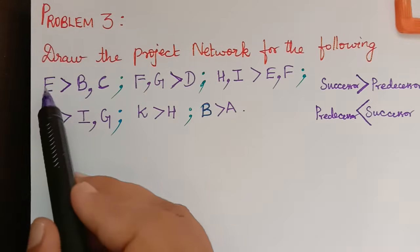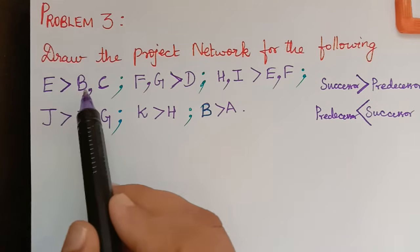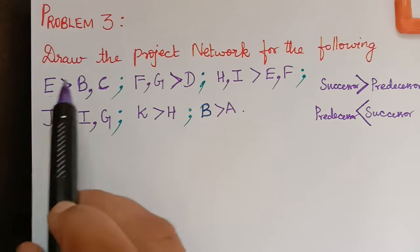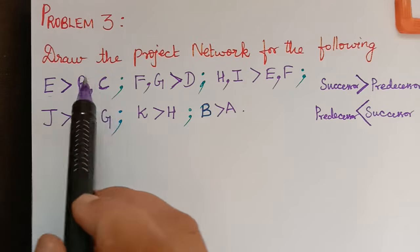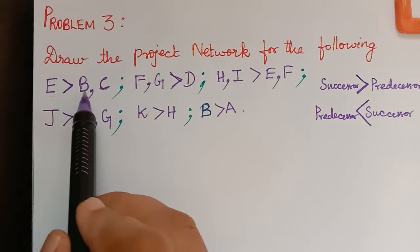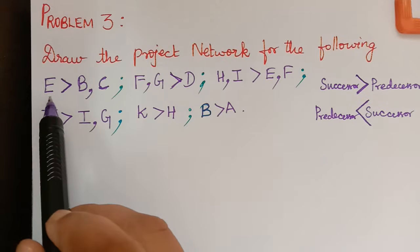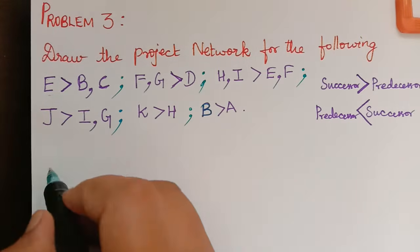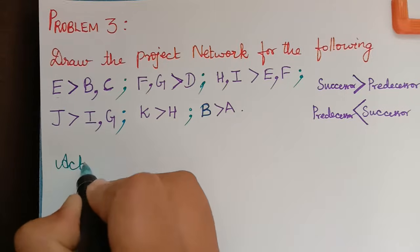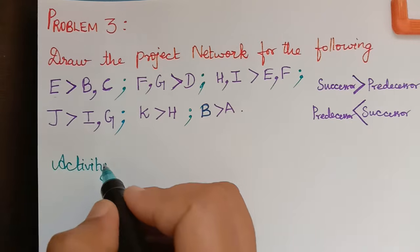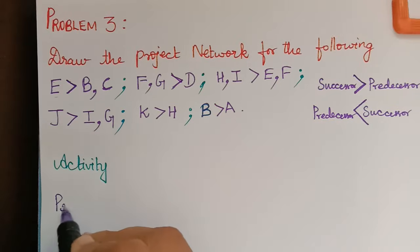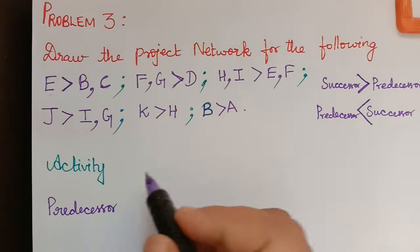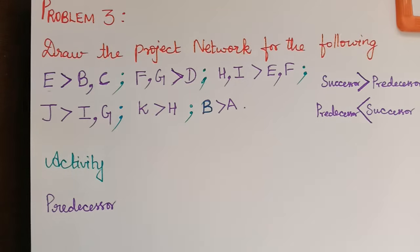For example, E greater-than B, C means E is the successor of B and C, or we can say B and C are predecessors for E. We will first write out each activity and its predecessor so that we can draw the network diagram more easily.